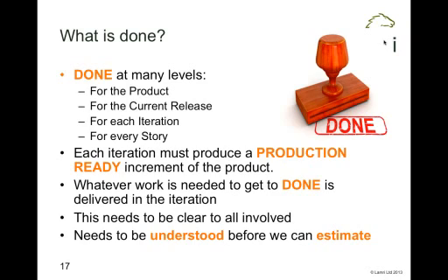So does it mean I have got a user story elaborated, I've written some code, and I've checked it into configuration management? Is that done? Maybe in addition, I've written some tests and implemented the test. Is that done? I've actually then executed the test and the test passed. Is that done? Perhaps I also need to write some user help screens. Perhaps I also need to think in terms of not only checking it back into configuration management, but pulling it out, doing a master build and deploying it onto a raw test platform, and the tests have to pass on that. So it's what level of done we actually need to achieve.